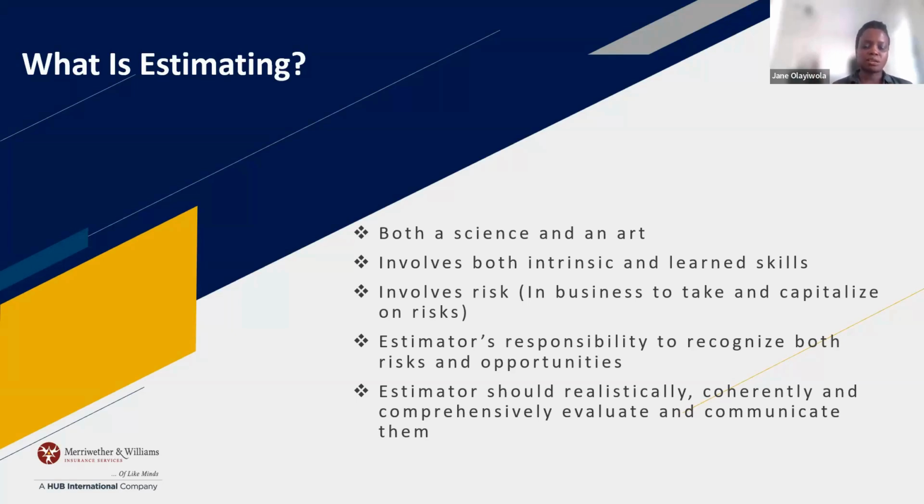Another source of risk is unforeseen conditions, right? Oftentimes, especially if it's a renovated project, it's impossible for you to know ahead of time everything that you're going to encounter. Let's say you're doing some demo work and reworking a portion of the scope of work. You don't know what might happen when you open up a wall, right? You might meet surprises. Those are risks that you have to plan ahead for. As much as you don't know how much risk there is, you have to be willing to accept that there will be some risk and plan ahead for that, okay?